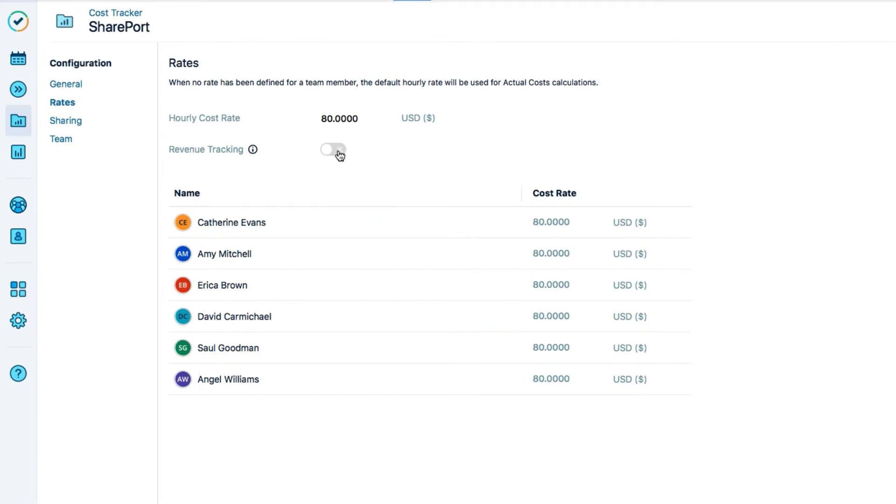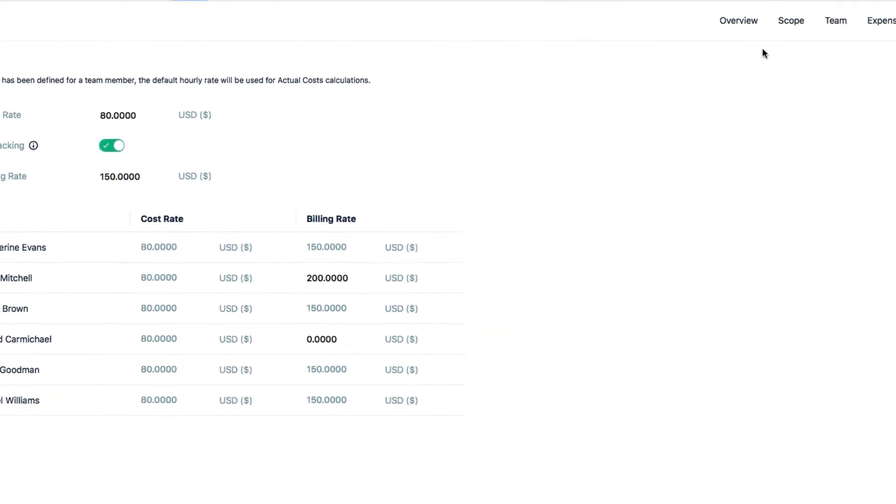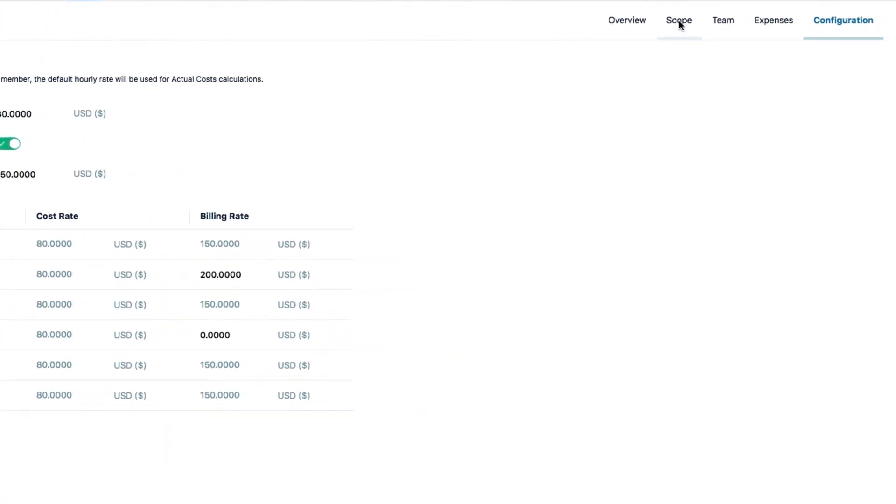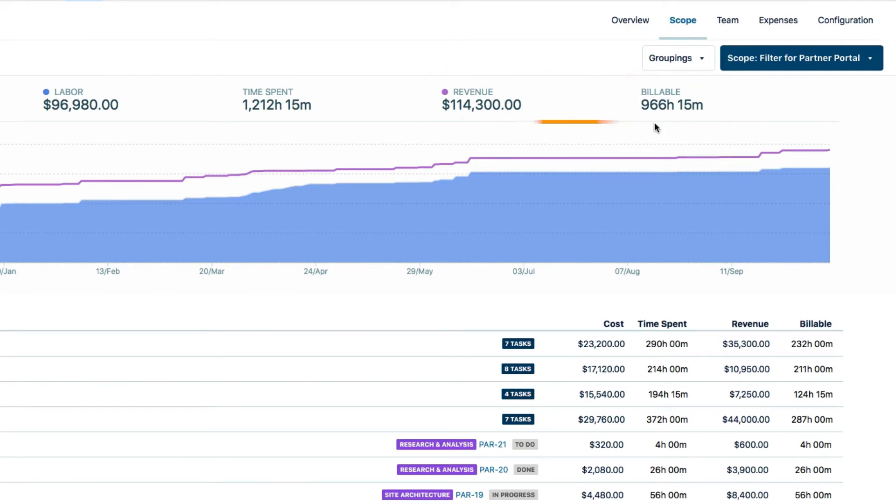In Cost Tracker, when you're tracking revenue, issues that are identified in Tempo as internal issues are not considered as billable, so they're not part of the revenue calculations.